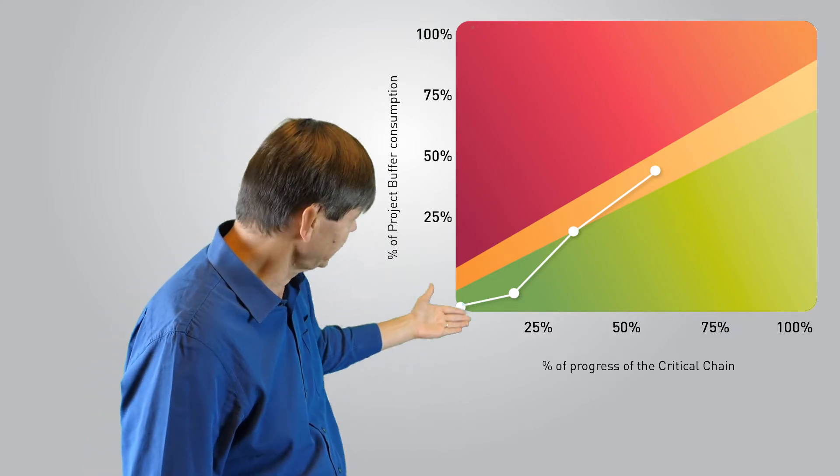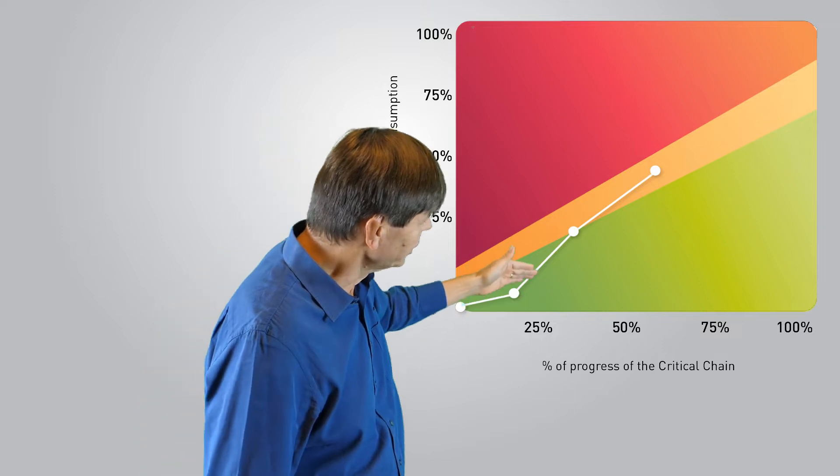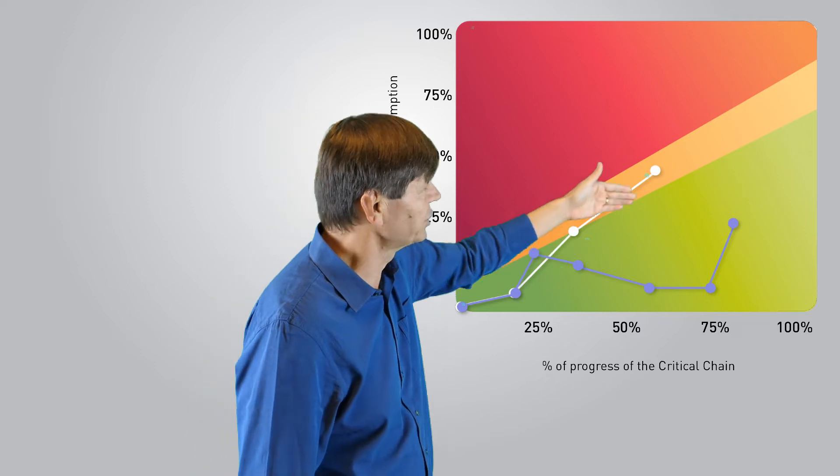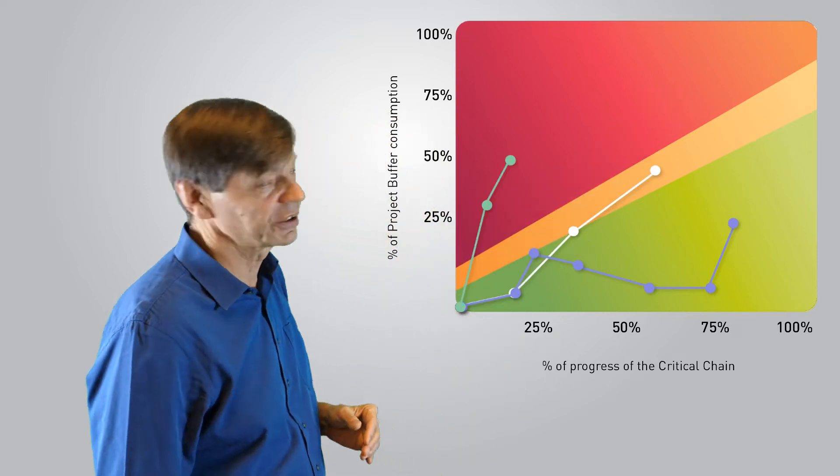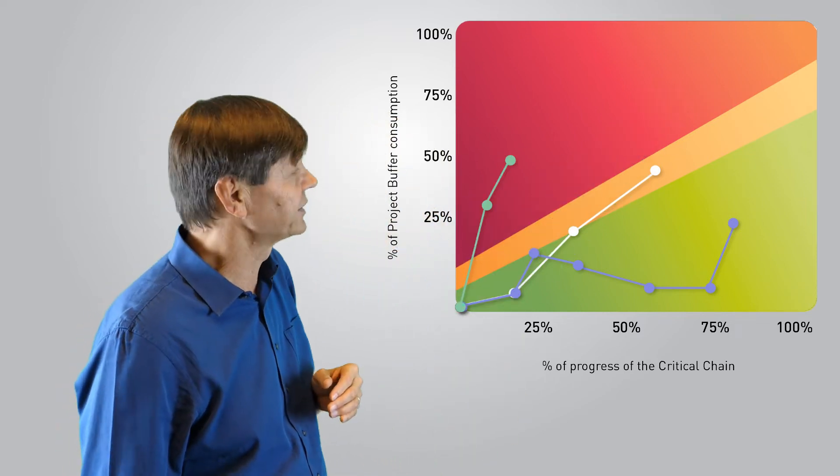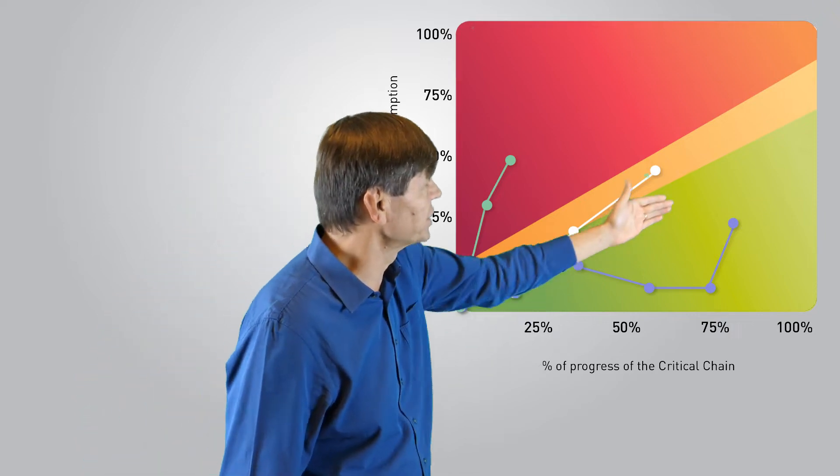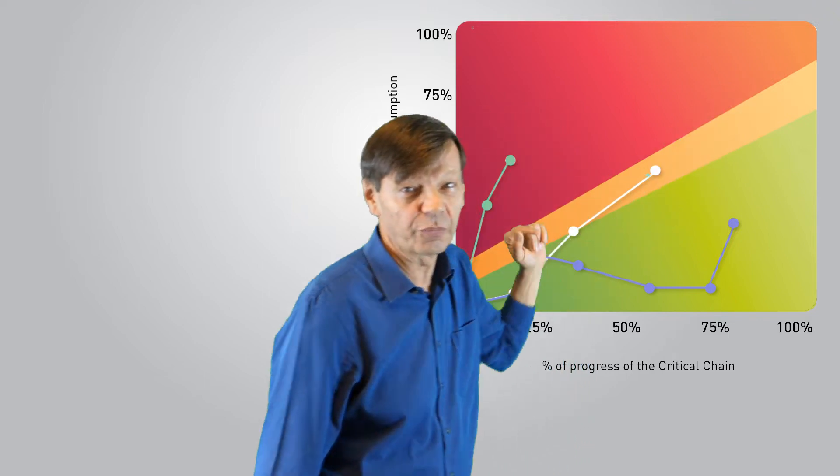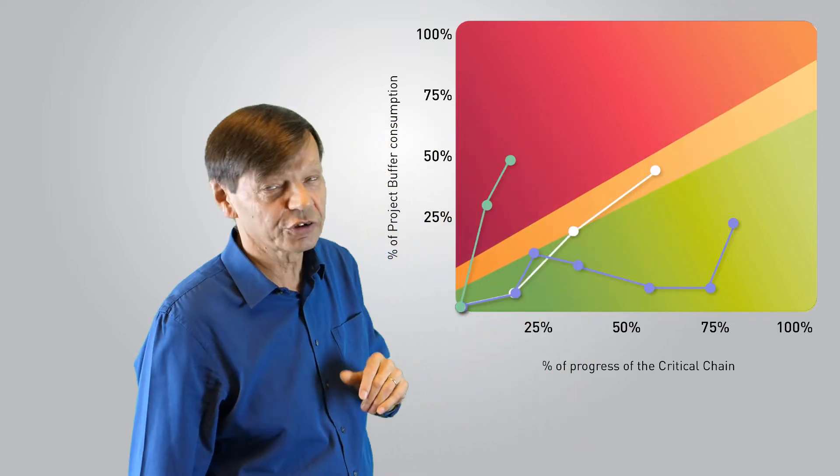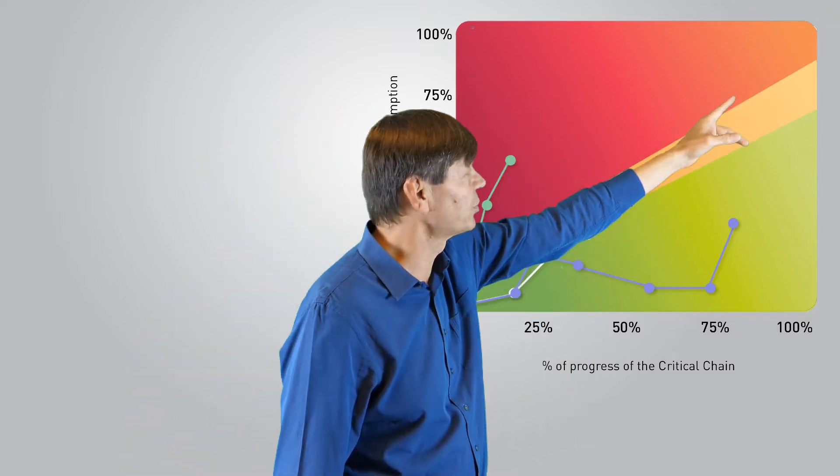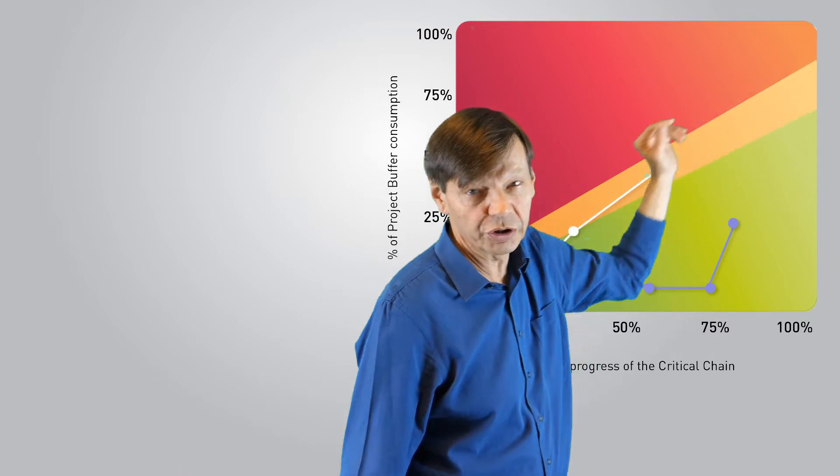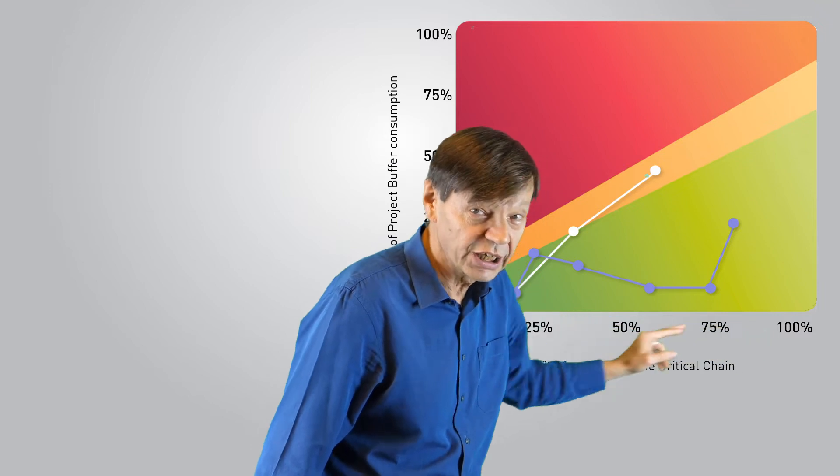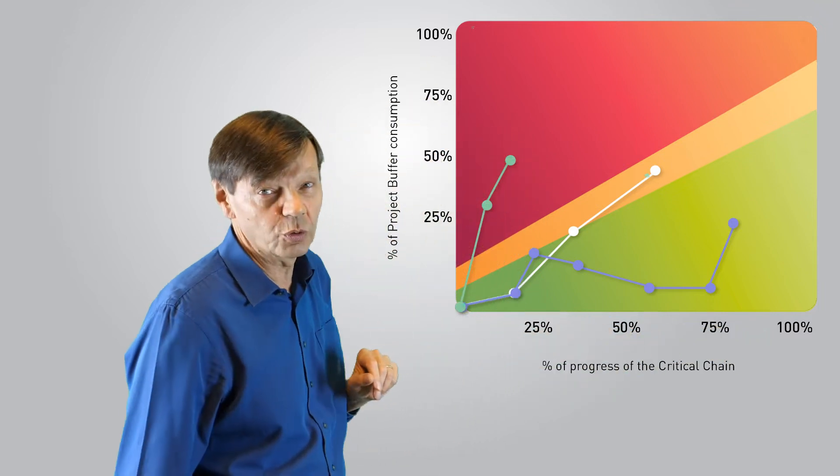When you are executing a project, obviously you start down here at the origin right at 0%, and as you do the work and progress and consume some of the buffer, you end up crossing this graph. If all goes well, you'll probably finish around here—that's to say, not quite up in the top right hand corner, because in fact the top right hand corner is the date you will promise your client or your management. That's to say, you expect to have finished the project of course and to have consumed all of the buffer.